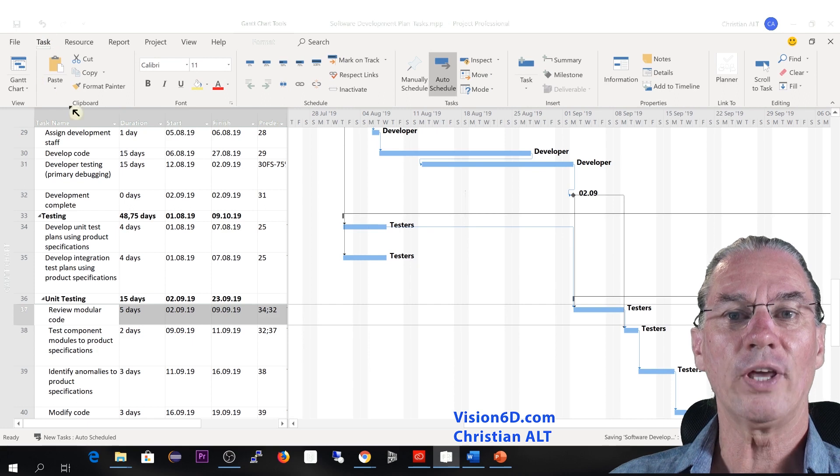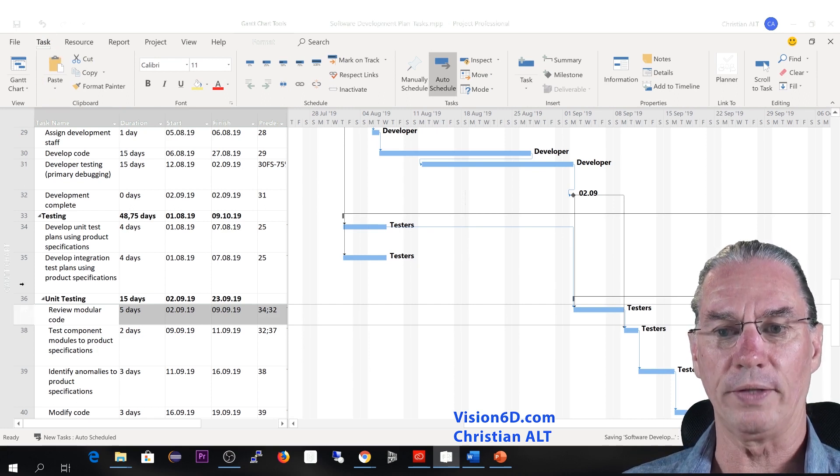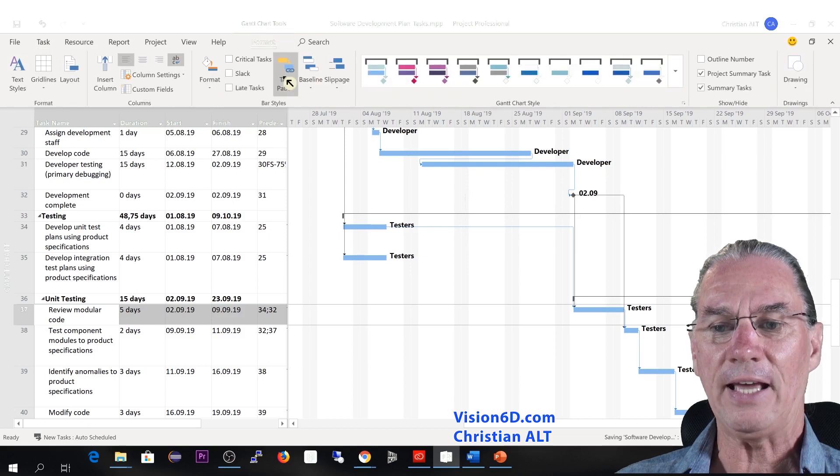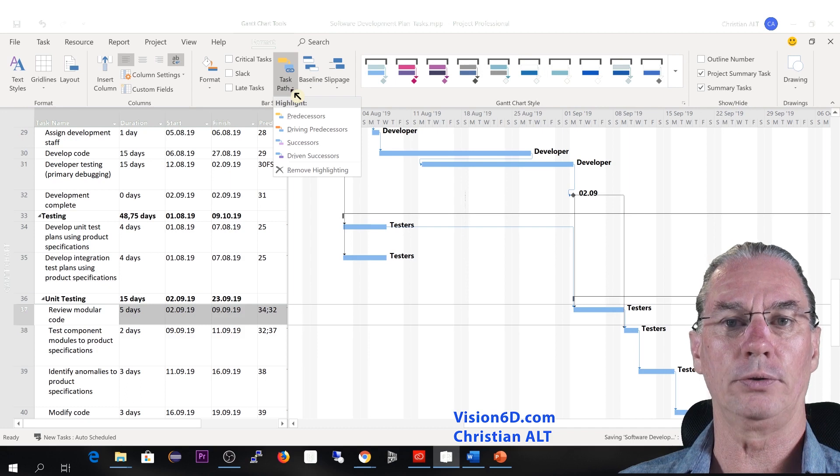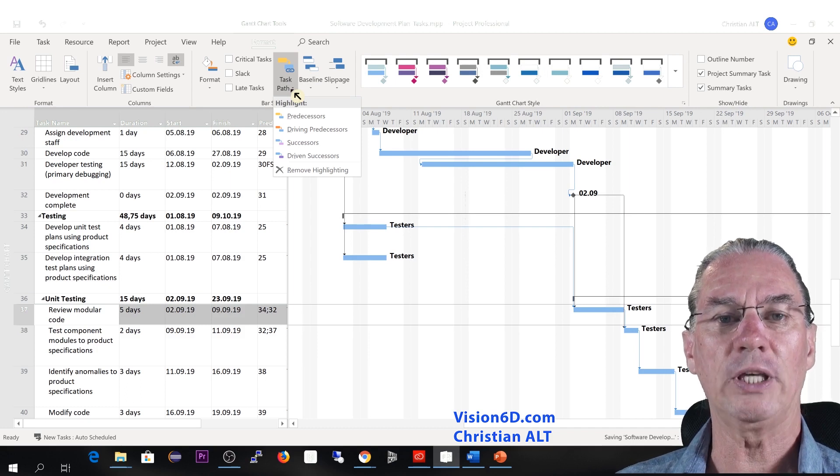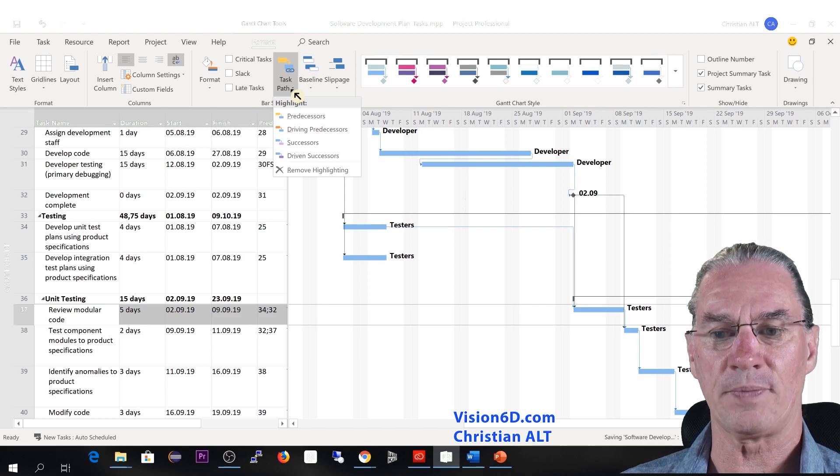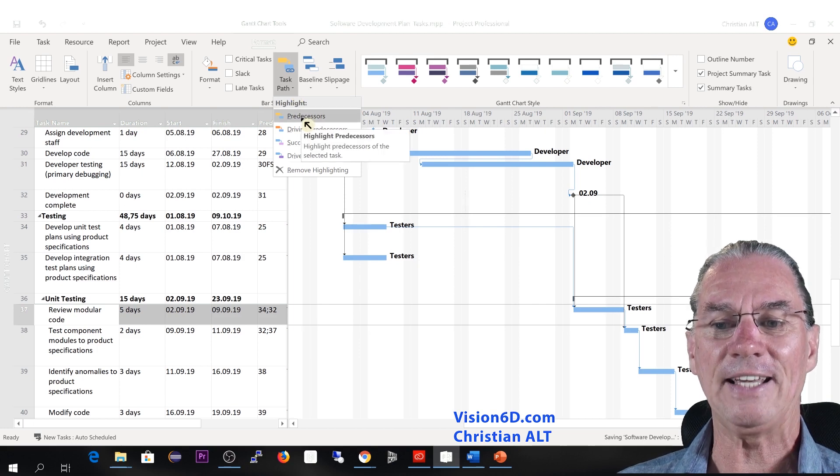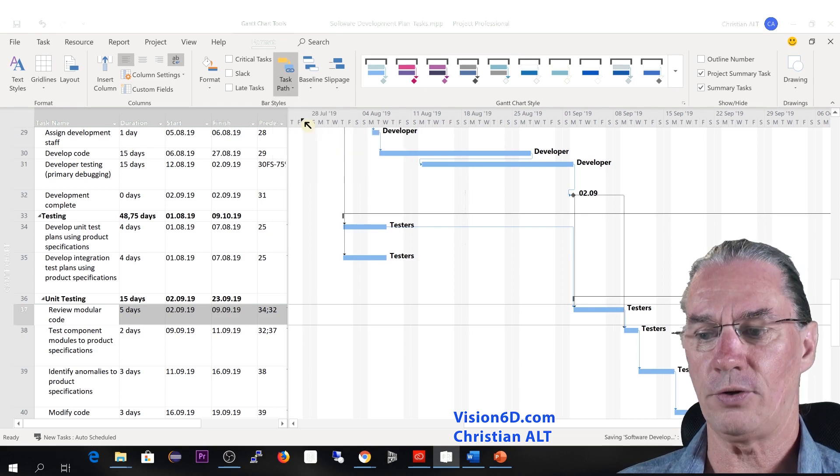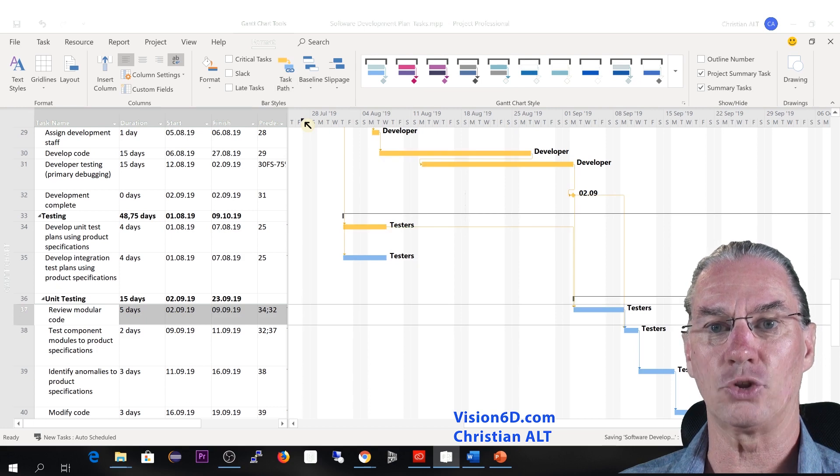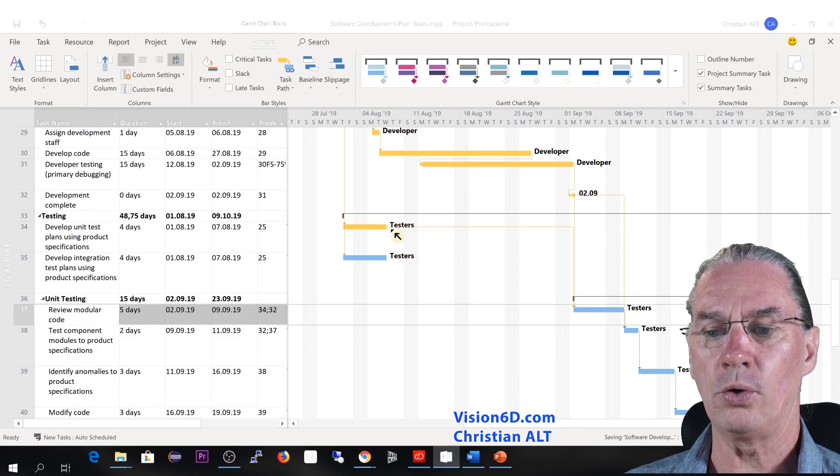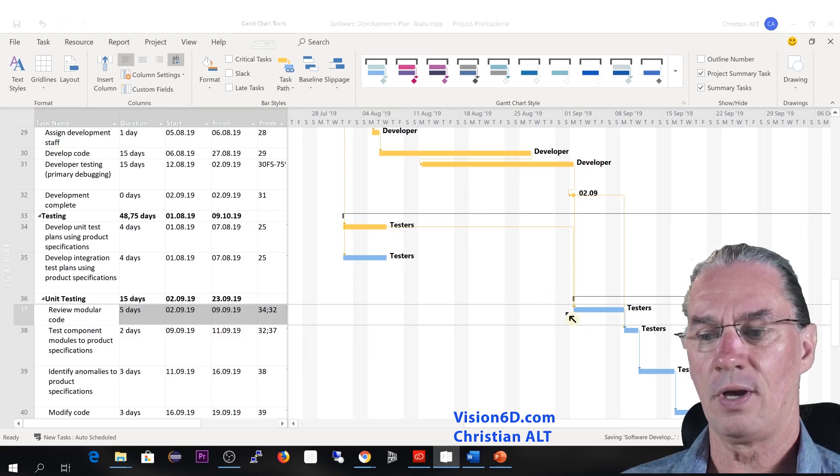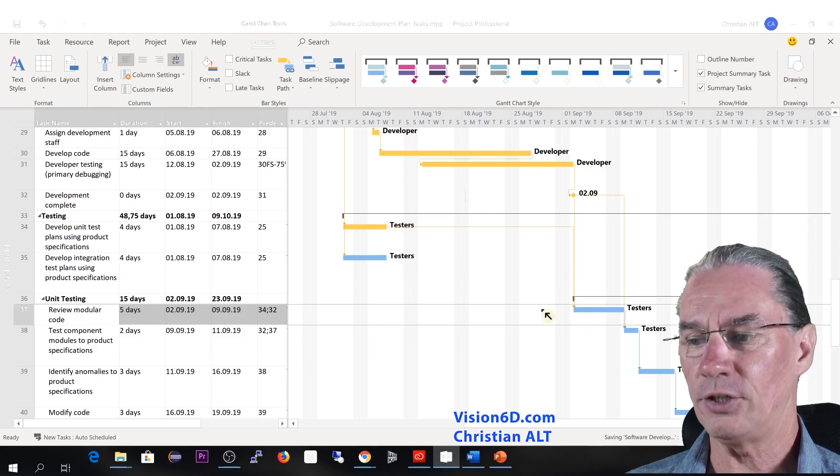So if you are in a task, you select the task that you want and you go to format. And what it will do is that it will change the color of the bars in the Gantt chart so that we can identify in an easy way which are the predecessors. And you see here that I can highlight the predecessors. So it's what I'm going to do and we'll look at what is going to happen now on the diagram.